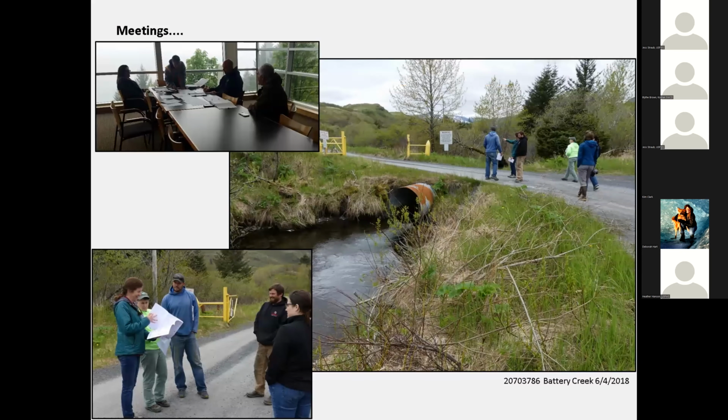Meetings. Review and remind about invasive species during pre-construction and pre-work meetings. Review and remind again when you meet with the contractor and other participants on site. Remember, you'll have more than the main construction contractor and subcontractors. There will be inspectors, landowners, project funders, engineers, surveyors, newspaper and radio reporters. Each and every one of them will be wearing boots, driving vehicles, and have the potential to carry seeds and plant parts.